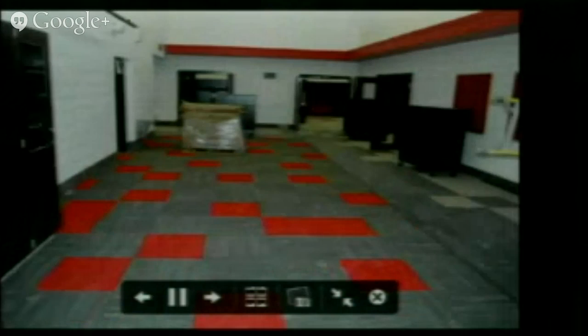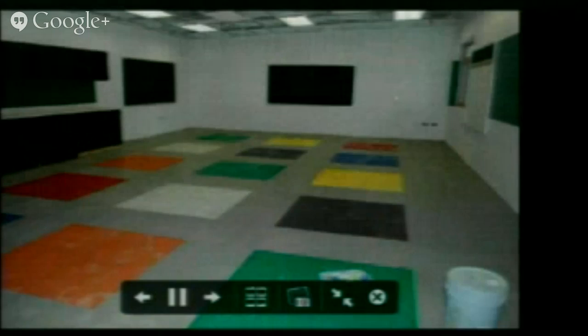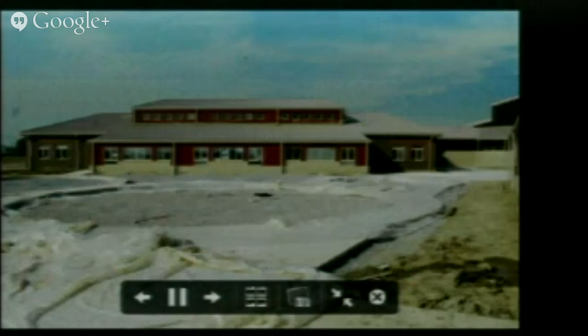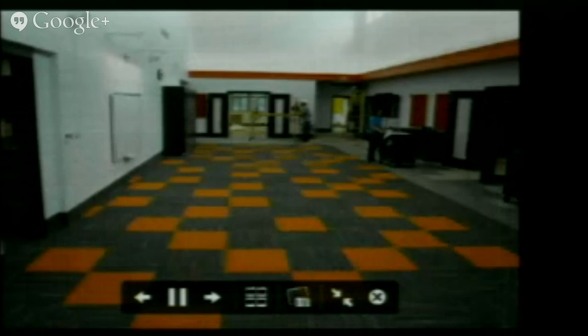G and F, which is your third and fourth grade, fifth and sixth grade. Those two, they're starting to put grid in and do your rubber flooring for the classrooms. They will be starting carpet pretty soon in the ELA extended learning areas. Smart boards and all your finishes will follow too. Probably within the next 2 weeks, they should be ready for punch list on that end of the building.